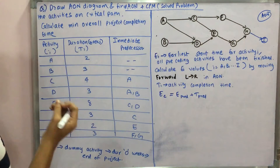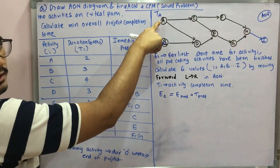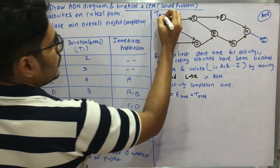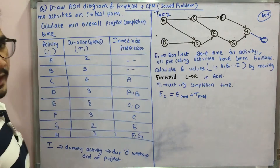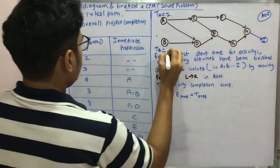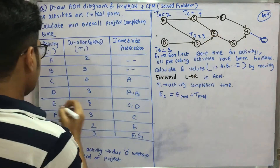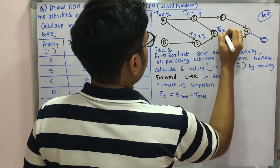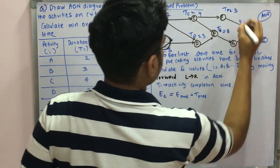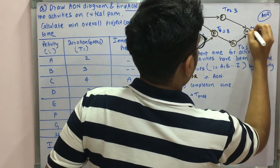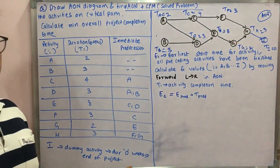Now assign the duration TI to each activity. TA is 2, TB is 3, TC is 4, TD is 3, TE is 8, TF is 3, TG is 2, TH is 3, and TI is 0, since we assigned the dummy activity 0 weeks.